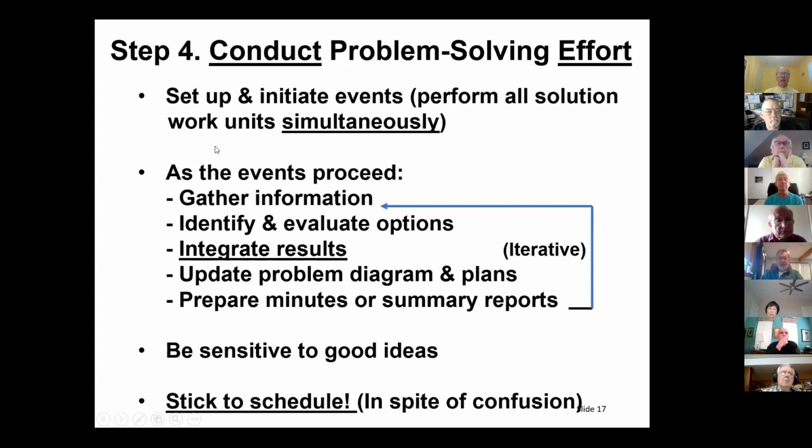We're going to initiate all of those efforts simultaneously. We're doing that because we don't know how one relates to the other. We can't put one before the other and say that's the way they should fit. We don't have that knowledge or ability, and it's not even apropos to these wicked problems. So we start them all simultaneously.